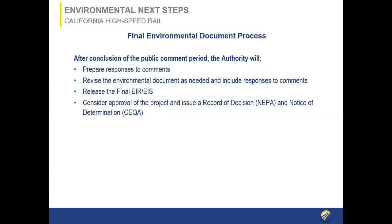After the conclusion of the public comment period on July 31st, the authority will prepare responses to comments. Those comments are incorporated into the final Environmental Impact Report/Environmental Impact Statement. In the final EIR/EIS, revisions are made to address factual corrections or clarifications needed in response to comments. Once the final EIR/EIS is completed and published, it is presented to the authority board of directors to consider approval of the project and issuance of a record of decision under NEPA and filing a notice of determination under CEQA.